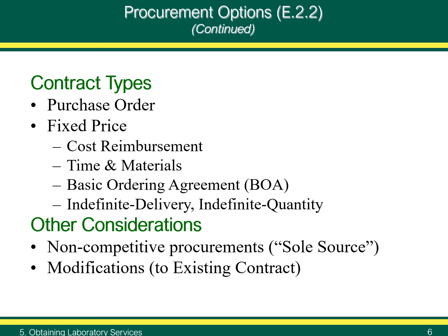Modifications to an existing contract. An agency may expand or extend an existing contract to cover additional authorized work. The terms and conditions must implement options already built into the contract, and the approach must meet a need that is consistent with the type of contract already in place. For example, a method for sample processing may be added that is similar to work already covered.